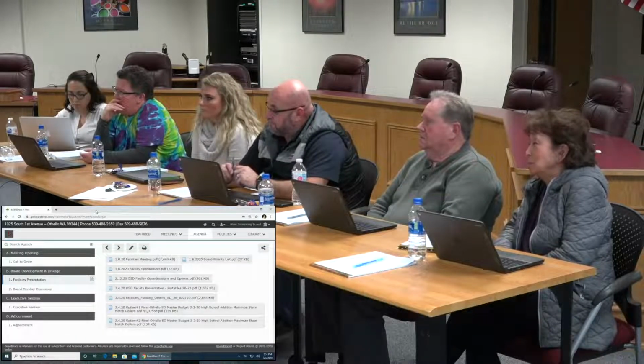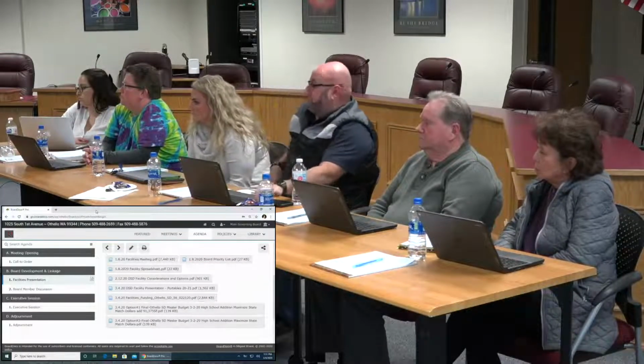We were able to set a pace with your growth where the original plan was still the $28.6 million bond, and the match was very low because it was being spread amongst the facilities. The strategy when we came in was you focus on this school, you capture the state match, and you see that with the high school. If you do the high school first, you're capturing that 15 million, and then you're rolling it. So if you pass a bond for the high school total project cost, and you generate that 15 million in state match, that rolled to the next project, which was also eligible, so that 15 million went into that and generated state match again. So it was all about the pace moving through those. By the time we got to the end, we continually generated matching funds on each project in a stair step. So in a sense, you're generating state match.